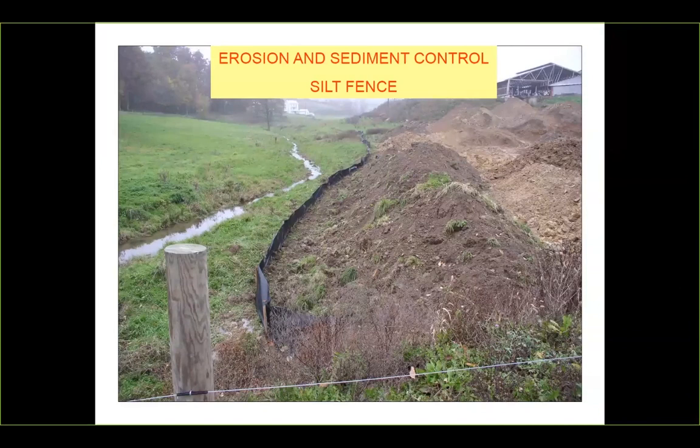So they say, hey, we're ready to start putting out gravel and doing all that stuff. Well, the first thing you're going to check on site is your silt fence, making sure that we are protecting those resources, that we're actually doing these practices to protect and safeguard. One of the key points in the construction activity is during the grading and stockpiling, which should also be indicated on the drawing. Make sure the stakes are installed appropriately.